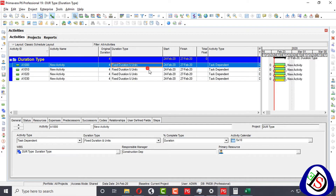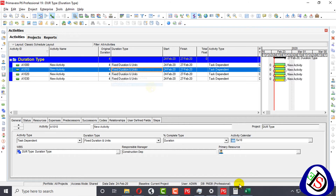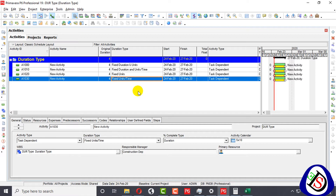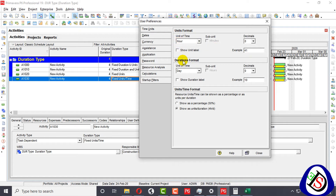We have four activities with different duration types: the first is Fixed Duration and Units, the second is Fixed Duration and Units Part Time, the third is Fixed Units, and the fourth is Fixed Units Part Time. 'Part time' refers to duration — in user preferences, you can see that the duration format is in days, not hours. So when you compare units, you compare with days, not hours.